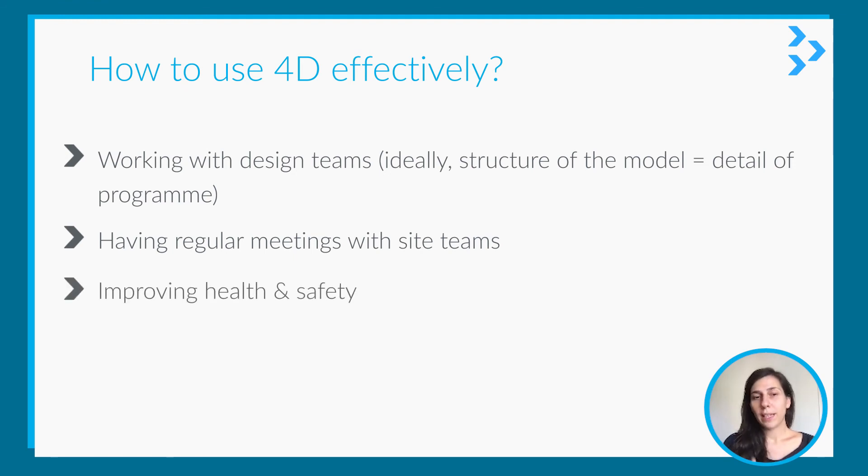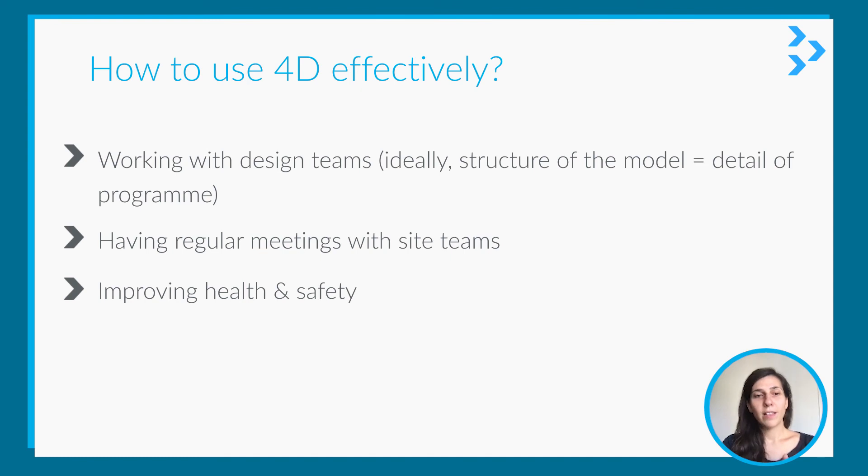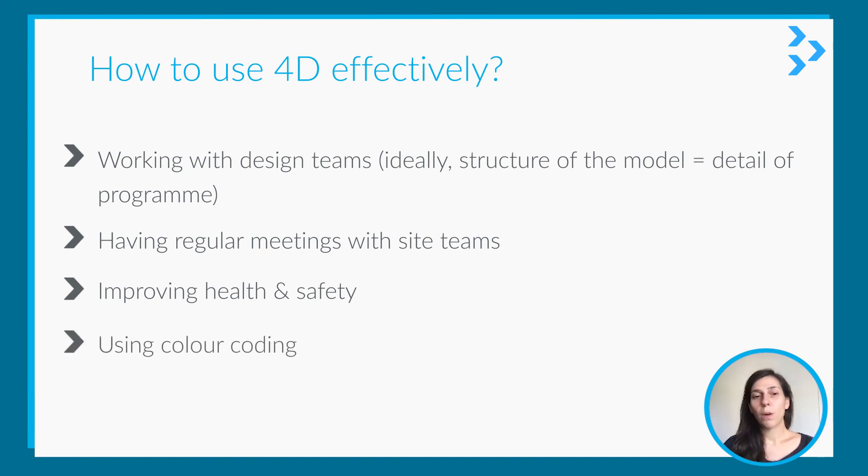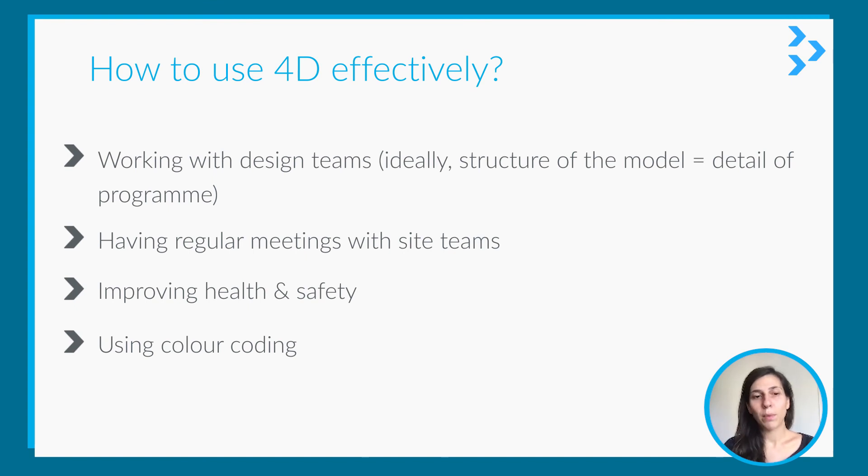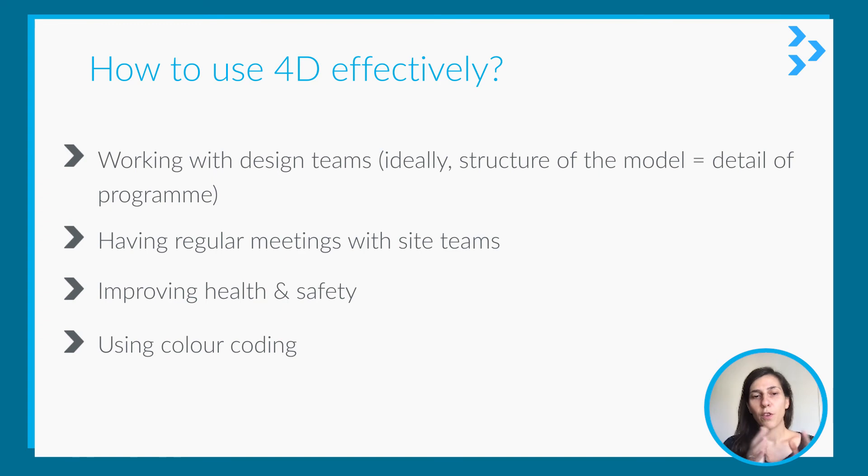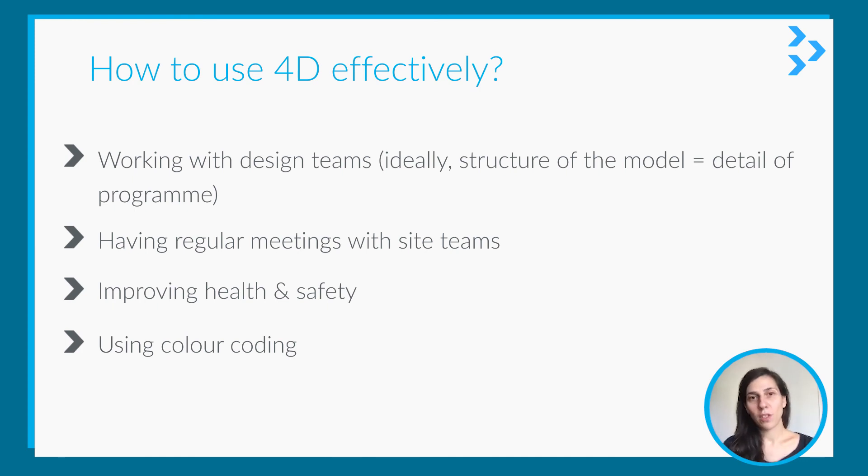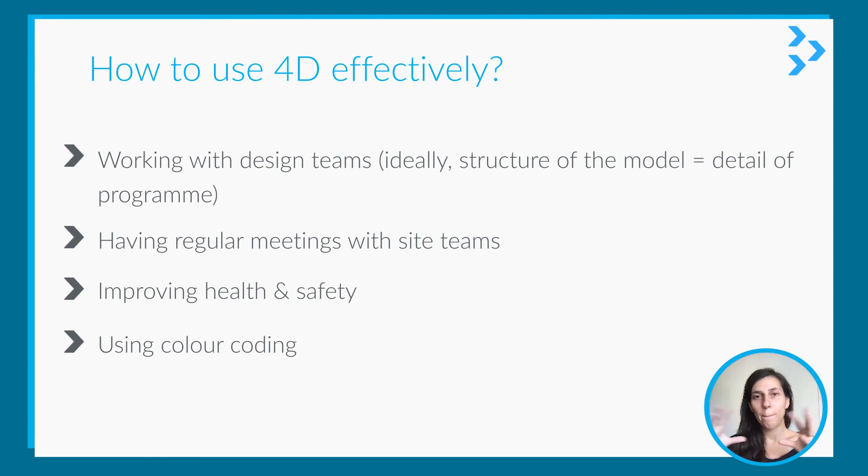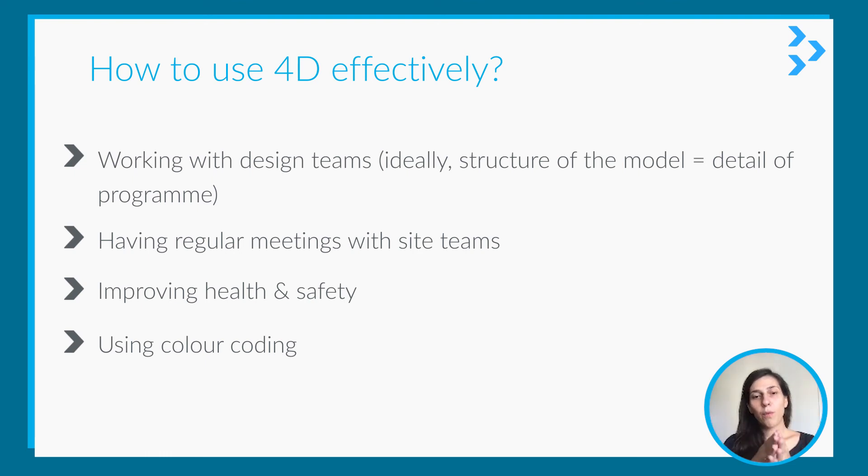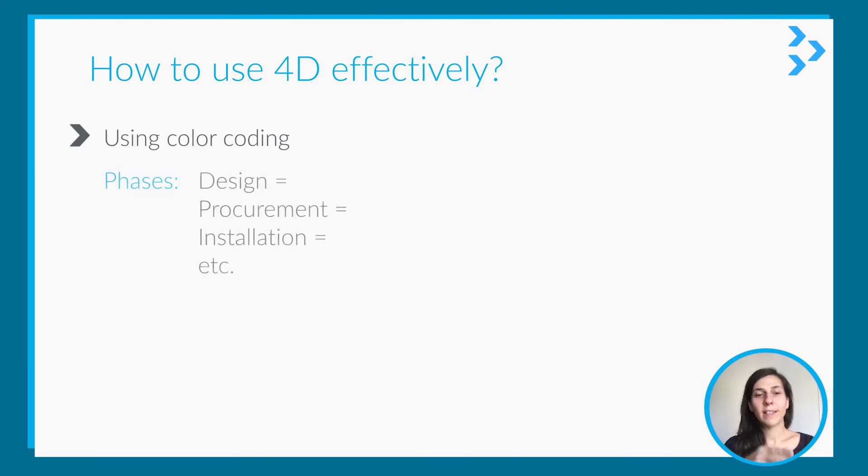Definitely you can implement health and safety. And my favorite one is using color coding. In Synchro and other 4D software, you will be able to put different colors for different phases or to show progress—it's up to your imagination. For example, if you want to use it for phases, you can show the whole project, whole model.